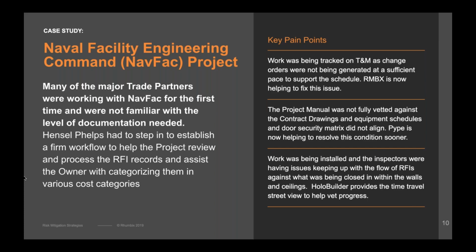As we started going through the submittal process, it became very apparent to all stakeholders that the program requirements were not fully coordinated. In certain rooms and systems, we had 3 different project specifications to coordinate in addition to the architectural, security, and structural drawings. This put a huge burden on the staff and the subcontracting team to wade through and distill down what we needed to do at each door opening, each room, and each subdivision.